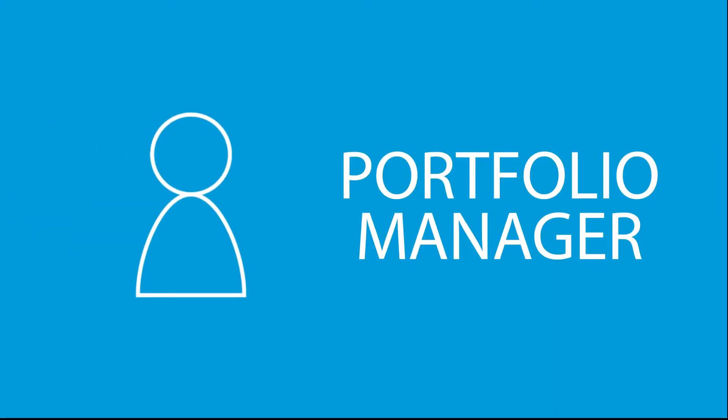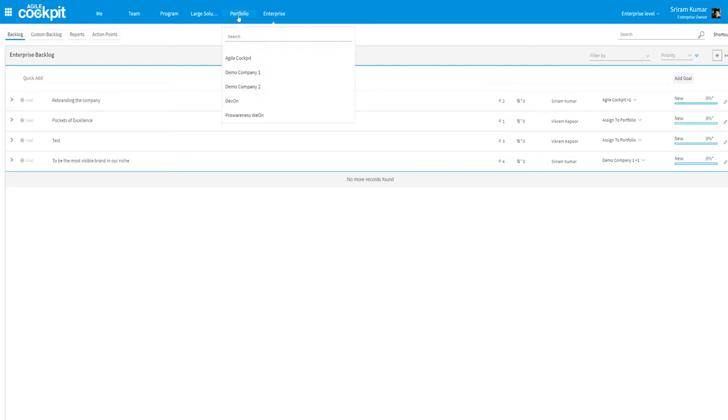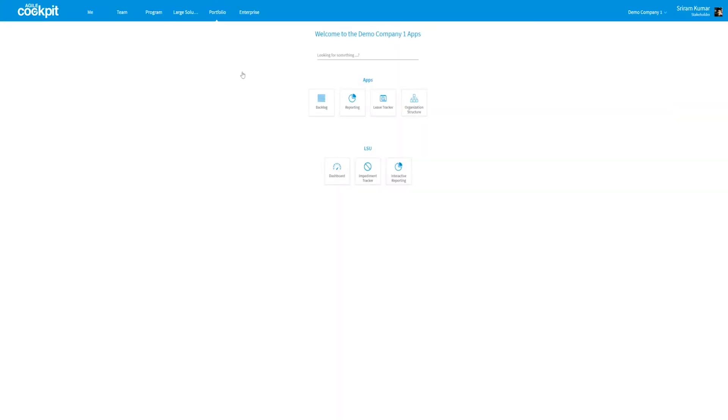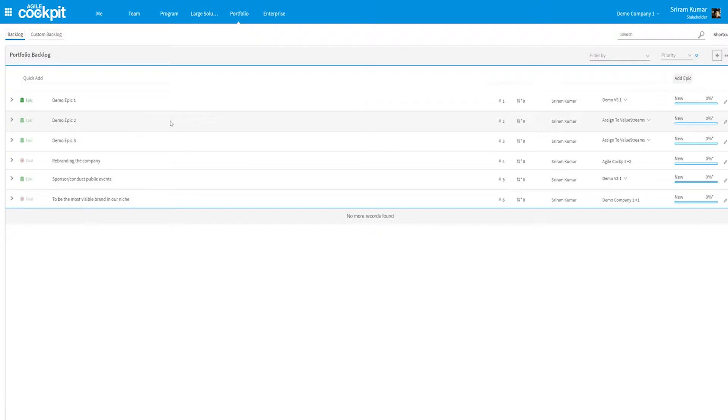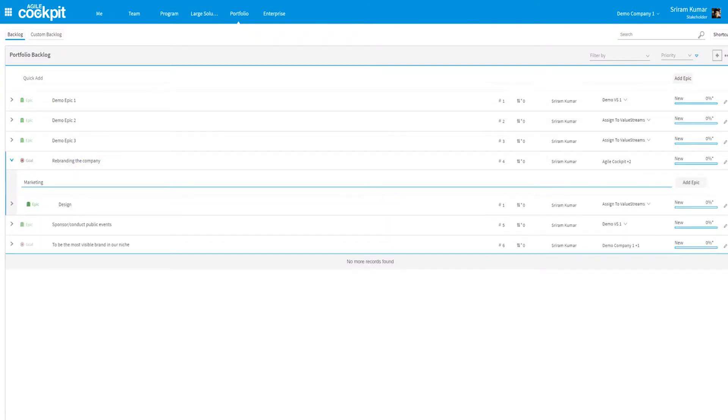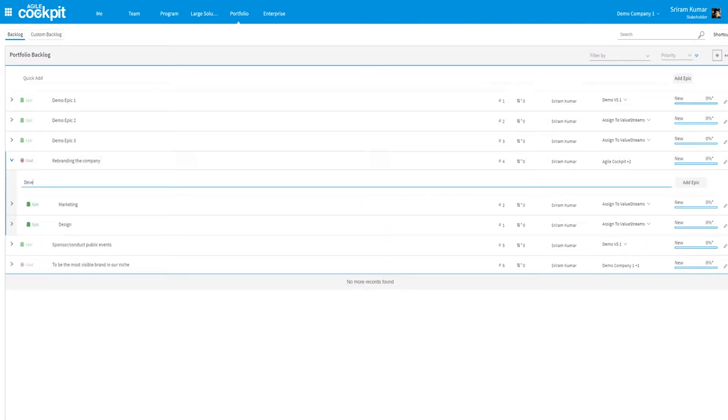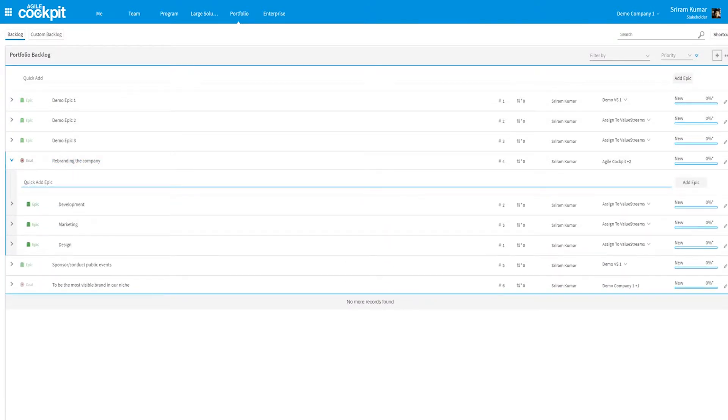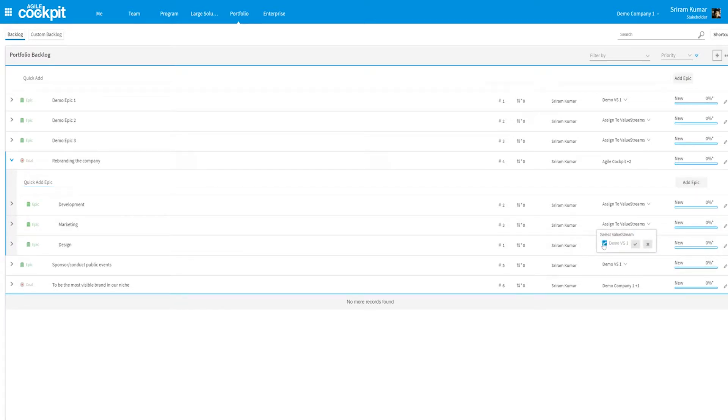But what does your portfolio level do with that goal? If you're a portfolio manager, you can look at your assigned goal and create epics in which you believe that the goal is accomplished when these are delivered. Each epic can be assigned to the next level in which that level picks it up.